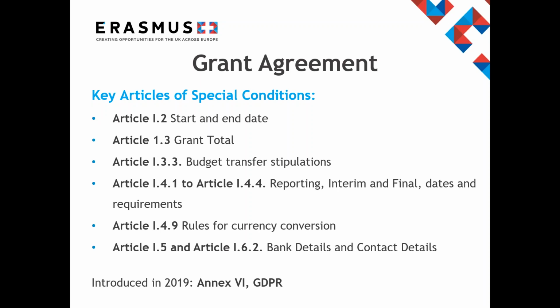In Article 1.4.9, exchange rates you need to use can be found. The exchange rate for your project should always be taken from the day you receive your most recent payment from the national agency, and the rate should always be calculated from the Commission's own currency conversion tool.